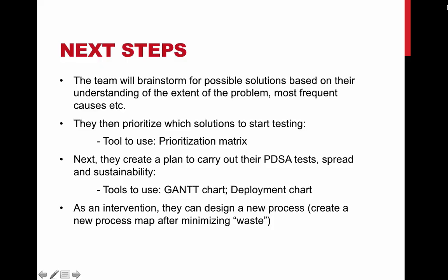So let's say now they come up with 8 different solutions. Okay, let's say for tackling the transfer to rehab process, they come up with 8 different solutions. Now, out of these 8 different solutions, which one should they work on? What will that depend on? That will depend on the ease of implementing the solution and the impact of the solution. That will depend on the resources the solution will require. That will depend on the support they can expect from all the key players in their system, etc. Okay, so the success of their solutions will depend on a bunch of factors.